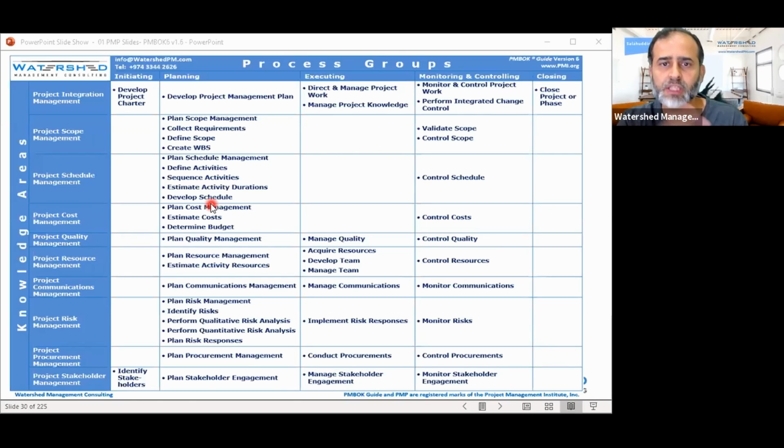Too many things happen in planning. So leave your baselines to the later part of planning, almost to the end. Once you make baseline and find you have to change your resource, you need to get approval. So don't get your baselines in the middle, get them towards the end. But accept scope baseline: get it as soon as you can, as long as you're doing the right, full, proper thing.